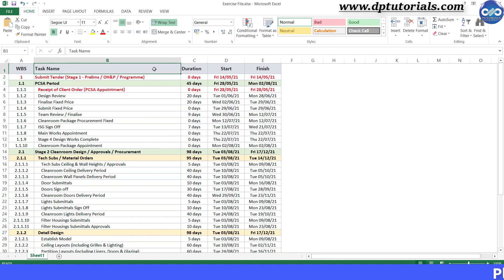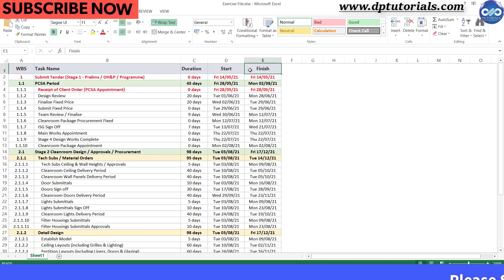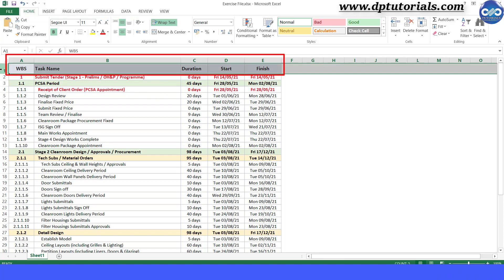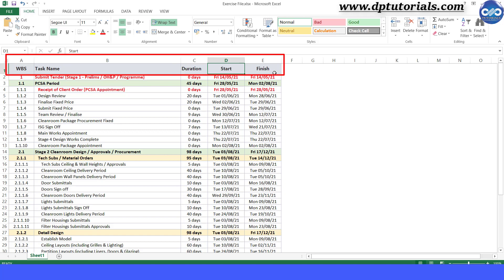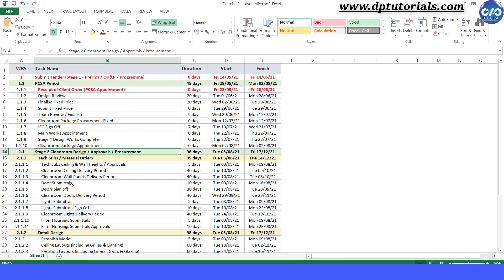If we have the right headings in the Excel like this, it would be easy for us to map in Microsoft Project. In the first row, we have got headings like WBS, Task Name, Duration, and Start and Finish dates, and then we have the content like this.